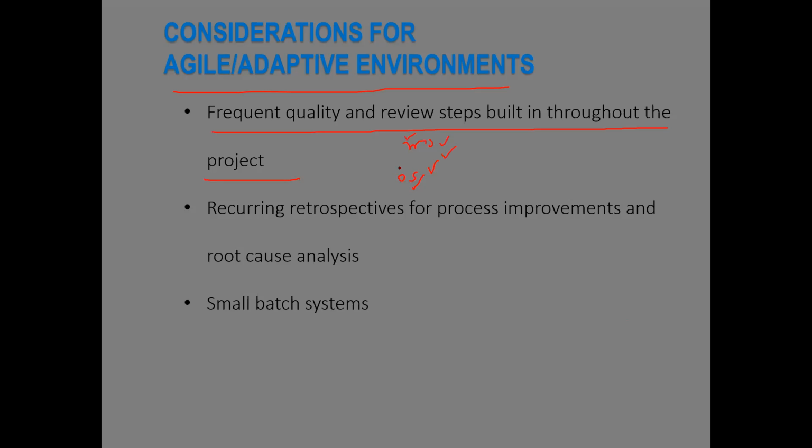When we say in seconds, I'm talking about pair programming. When I talk about minutes, I'm talking about testing, unit testing. When I'm talking about days, I'm talking about daily scrum meetings. Weeks, that are our retrospectives meetings, and also our iterations and their reviews. And months, basically talking about our releases. We always have recurring retrospectives for process improvement, product and people improvement.